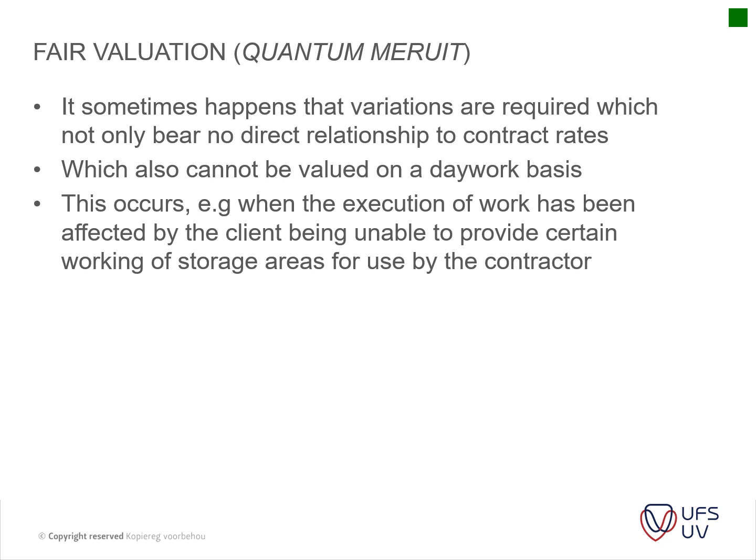For instance, if certain circumstances on site, now the contractor has to incur additional cost to secure the site. It was said in the tender briefing that the site would be secured, and now the contractor arrives on site and sees that there is no security on site. Now he has to get a security guard, he has to fence off the site, etc.